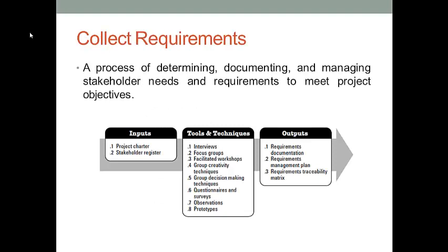The first step is to perform a requirement analysis among the future users and customers of the products and services produced by our project. They are the end users, so what they want should be the goal of our project. You can use a variety of methods to collect the users' and customers' requirements. You can perform a one-on-one interview with them. You can distribute questionnaires among the future users and customers. Ask them which features should be in the future products or services. Some project managers also use observation as a method.